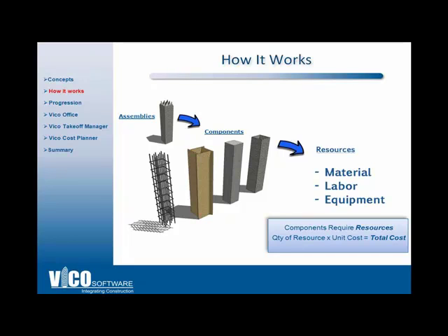If you self-perform concrete, for example, you're going to be able to break that down to material, labor, and equipment to create an even more accurate estimate for, as I said, self-performed trades or trades that you want to negotiate at different level.